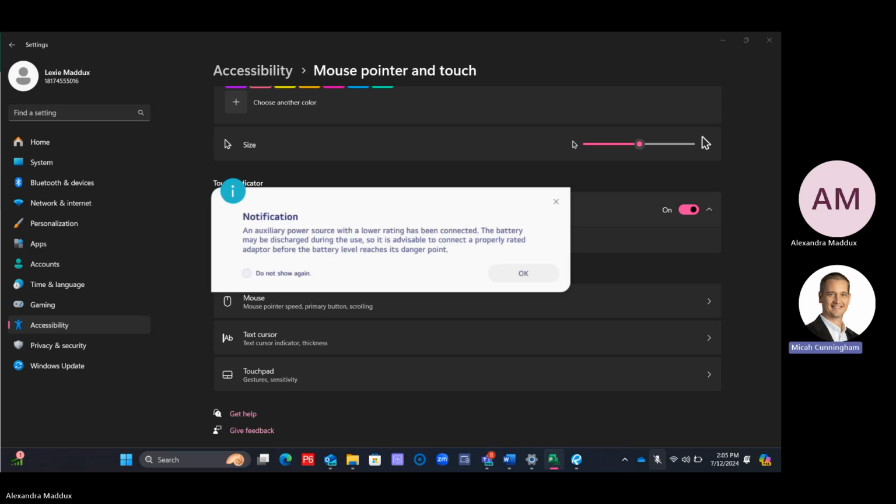It'll be critical because the first day of it is critical. It just depends how you have your logic tied in. So what is the easiest way to find those kinds of open finishes? You could run it through a software, or you can look at your relationship lines to see what's missing, or you can search your successors for anything that's a start to start relationship and make sure there's also a finish to start on there as well. Any questions on that?